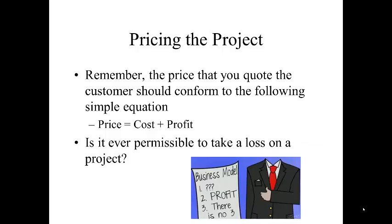The price you quote the customer should conform to this simple equation: price equals cost plus profit. Is it ever permissible to take a loss on a project? Yes, sometimes it is, especially if it's going to result in future work with that client. You might do a small project, taking a short-term loss in exchange for a longer-term large gain. Somerville had a case study in the 7th and 8th editions where the project would take two years at $200,000 a year for the possibility of future work — you'd need a pretty great line of credit to take that sort of risk.